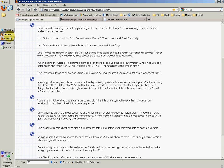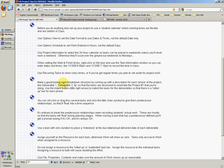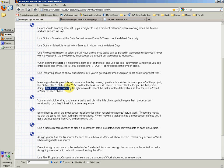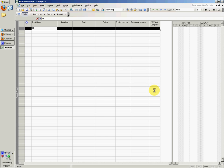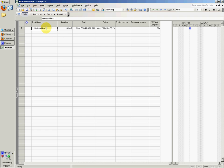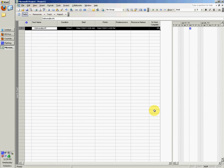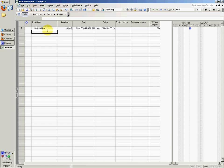Make a good looking work breakdown structure by coming up with a description for each phase of the project, like deliverable number one, deliverable number two, so that the tasks are structured to resemble the project number one that you're doing. Use the indent button to indent the tasks for the deliverables so there's a rolled up bar for each phase. You could say deliverable number one, or maybe give it a short description instead of just deliverable number one.